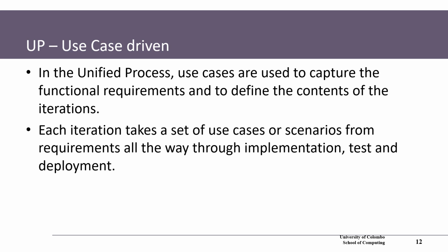So the use case is a tool in that case. Each iteration takes a set of use cases or scenarios from the requirements all the way through implementation, test and deployment, from beginning to the end, in other words. So this is the benefit all the time. You see how from the beginning to the end it was designed, developed, tested and deployed.